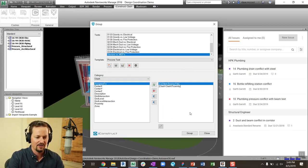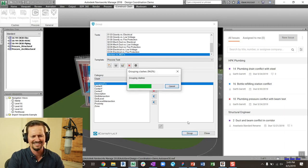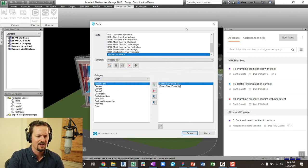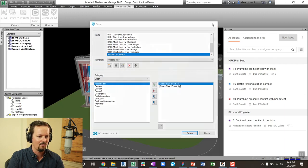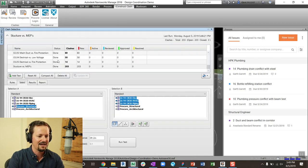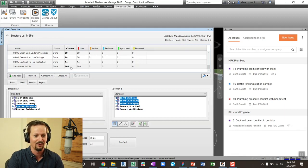And so I'm going to go ahead and run that on structure versus MEPs. It doesn't take too long, just finished up. And now let's go take a look at what that did. So just from a time savings perspective, I went from 600 to 200 clashes, much more manageable.